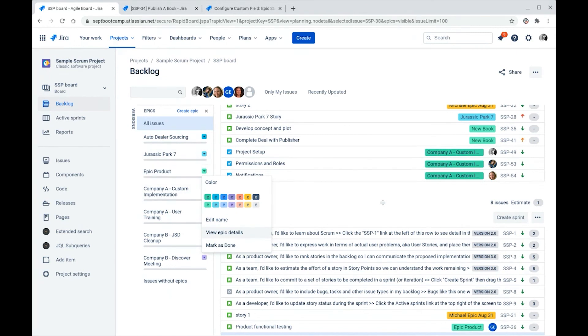So users may forget to update the field. So the recommended approach to updating the epic status field is through a workflow post function or a rule in Jira automation or some other automation tool that you have on your instance.